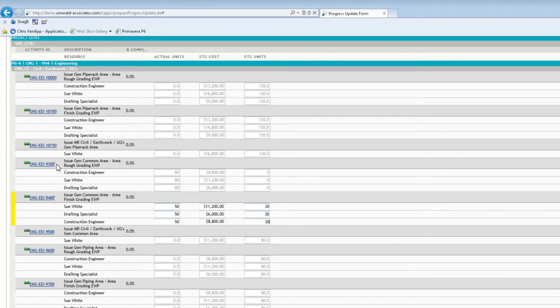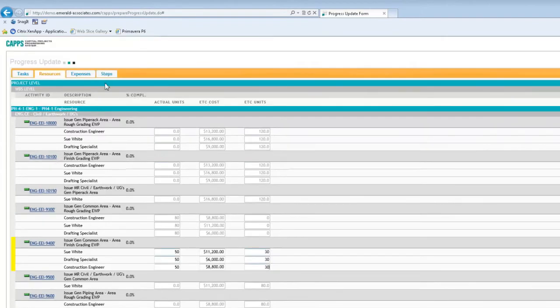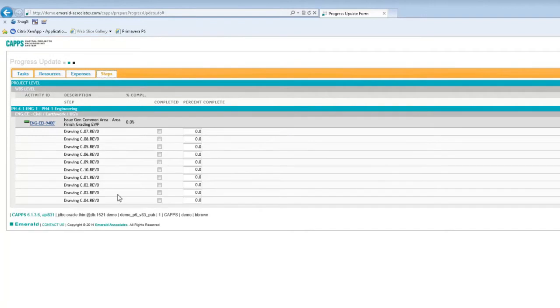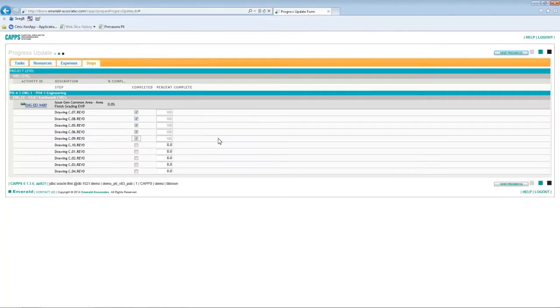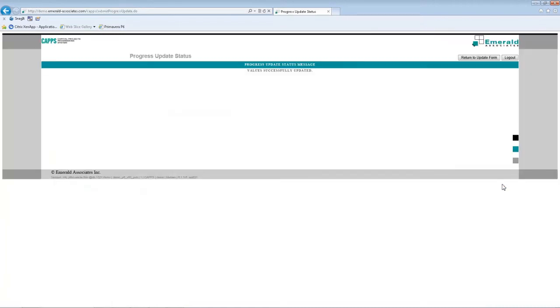And I have to also update steps. There are some steps on this task. So there are, as you can see, several drawings, and five of them have been completed. So I need to select relevant checkboxes. So once I've finished updating, I can click Save Progress, and I get a message on the screen that values successfully updated.